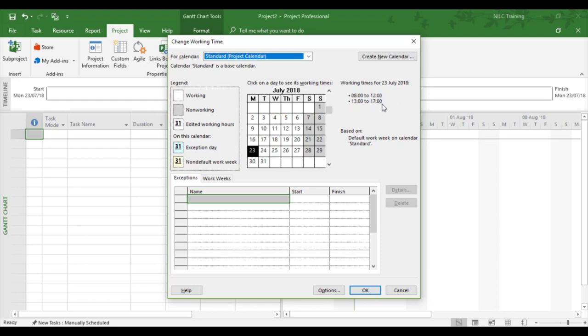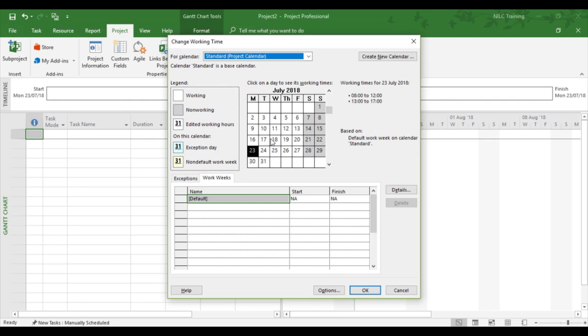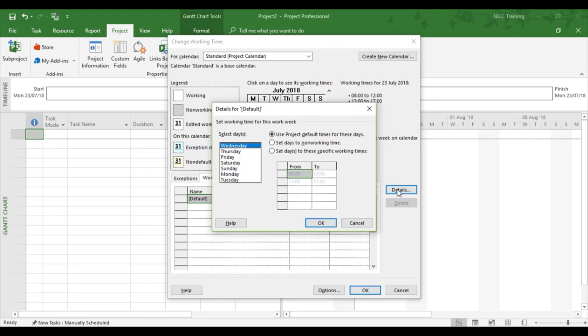So we might say in our example, well we don't want it to work eight hours because we've just changed it. So we've got to update the working weeks. And you'll note this project is still working on a Monday to Friday with Saturday and Sunday grayed out. So we need to change the whole of project's way of working right now through the Change Working Time for the standard calendar. So on the work weeks, Default, Details.